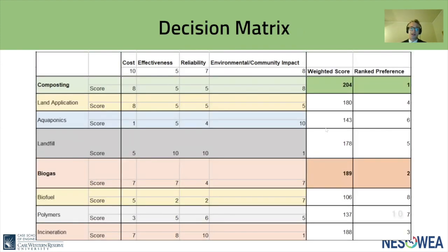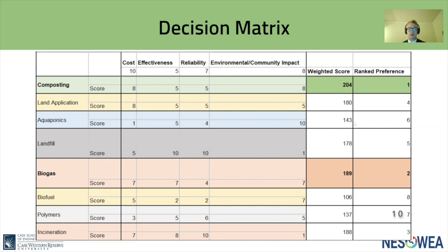We constructed a decision matrix to evaluate alternatives based upon cost, effectiveness, reliability, and environmental and community impact. With cost, we seek low capital investments and high revenue. Effectiveness refers to the amount of biosolids going into the intended treatment method rather than to the landfill. A reliable method has low seasonal probability of failure and high safety and ease of operation. With environmental and community impact, we look for methods with low net carbon footprints and low odor production. We evaluated five other methods, which were quickly eliminated as much less feasible than composting and biogas production.